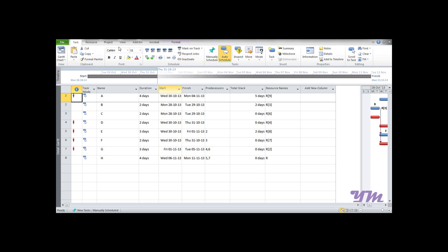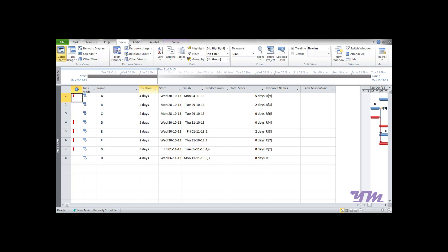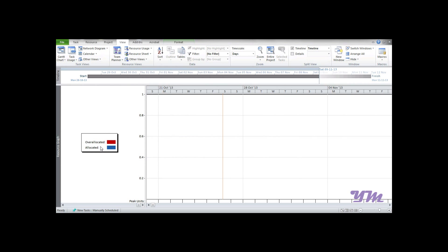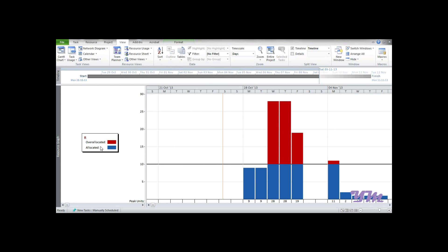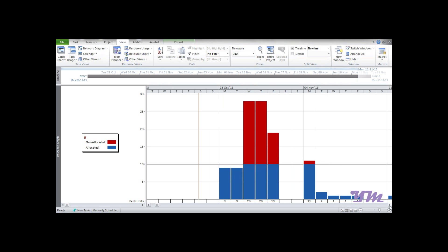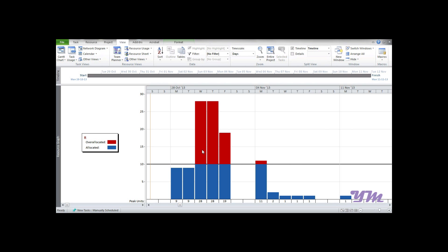First, let's see what the problem is. We can see a Resource Graph. To see it, go to View menu > Other Views > Resource Graph. If it's not visible, you can scroll or press Next to see your resource. We have a graph for resource R. Red portion indicates it's over-allocated on specific days, while blue indicates it's allocated and may be underutilized. Looking at the whole cycle, it's over-allocated on some days while underutilized on others.